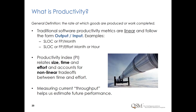Productivity in SLIM is not a traditional linear measure, but describes the efficiency of the whole project environment. Software project efficiency is determined by the capacity of the environment itself, affected by a host of factors — some quantifiable and some not — such as process and personnel factors like morale, experience, and management capabilities; technology factors like tools, infrastructure, and language; process factors like standards and maturity level; combined with product factors like size, complexity, hardware integration, and reuse of existing software and documentation. Rather than attempting to identify and predict each and every factor, SLIM calculates the total effect of all the factors, whatever they are.